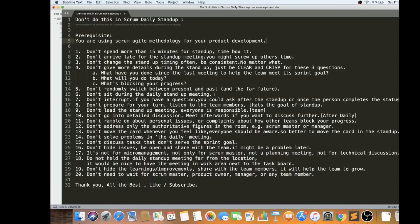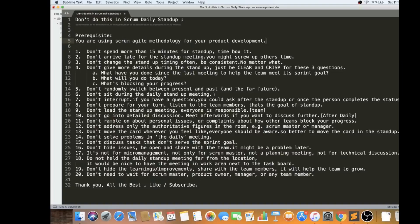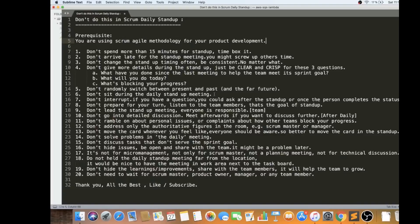The seventh one, don't interrupt. If you have any question, you could ask after the standup or once the person completes the status. You can raise your hand and ask a quick question. If it needs a big solution, if it needs a big answer, then postpone after the daily standup. But never ever interrupt a person when they are updating.